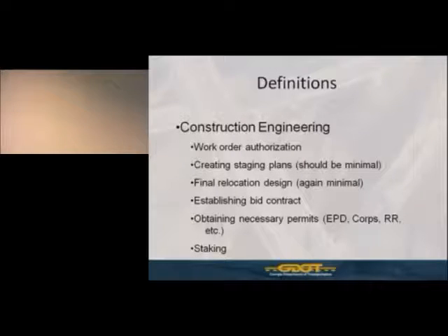The reason being, if there's been no changes to the roadway plans or to other utility facilities that had adversely impacted your relocation work, then the bulk of your design work should have been performed already, and this should be just minor tweaking at this stage based on some field conditions and so forth, but there should not be any major engineering required to finalize this relocation work.